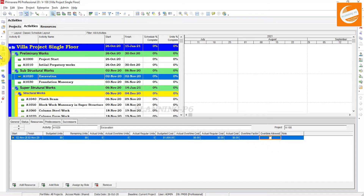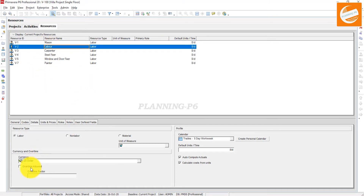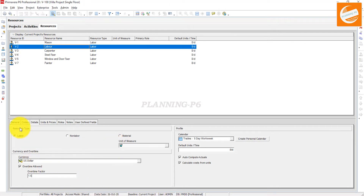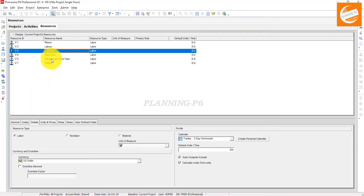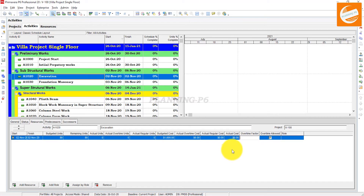Now go again to Resources and check that the overtime factor is enabled for this resource. Select the labor resource — Overtime Allowed — just fix this. You can allow overtime as per your resources; if you have allowed the Carpenter resource, you can allow it there too. Go back to your Activities and now you can see Overtime Allowed is checked and the Overtime Factor is 1.5.